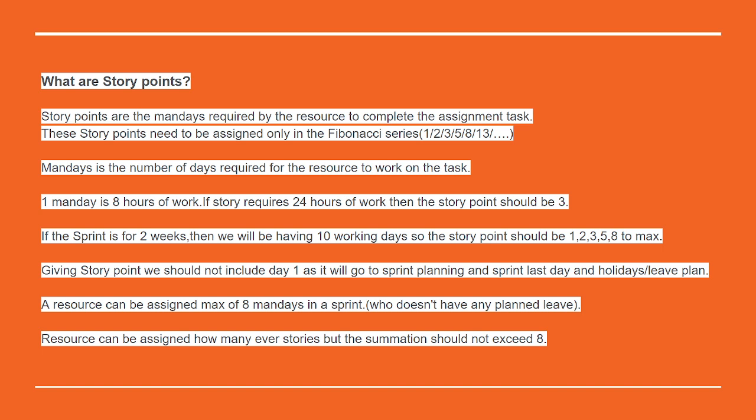If the person doesn't have any planned leave and the 2 weeks don't have any holidays, then there are going to be 8 work days. So these 8 work days only I can assign. Each and every resource should have only 8 days at the max. Next comes our clarification: can a resource be assigned two or more tasks, say one with two, another with three, and another with three? Yes, we can assign three tasks, but the summation of the mandates should remain 8.